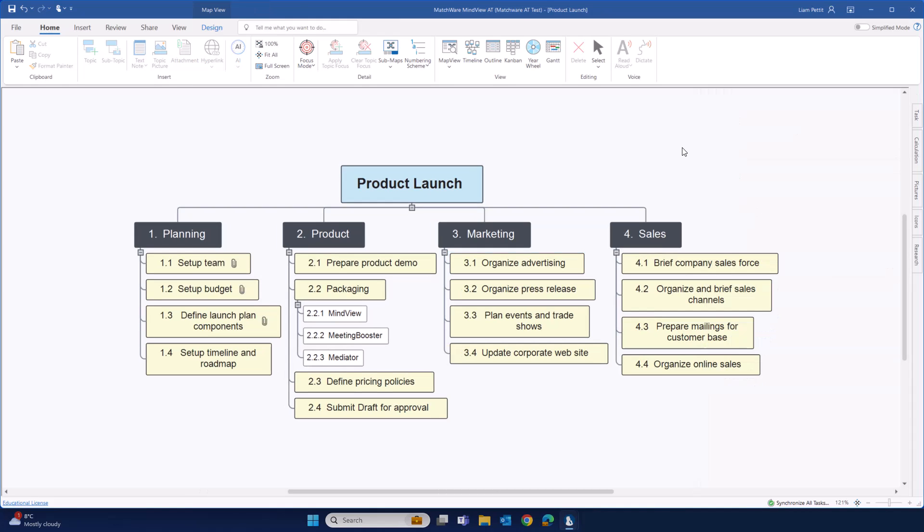So let's imagine that we've got to the end of the brainstorming phase and we now want to turn our work breakdown structure into our project Gantt. To do this, simply change the view of the work breakdown structure into our Gantt.